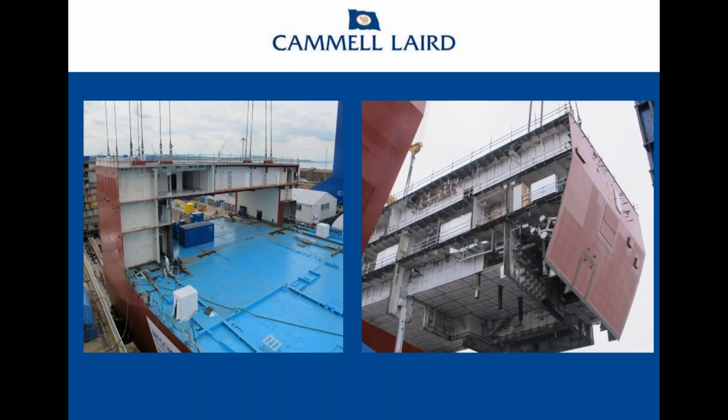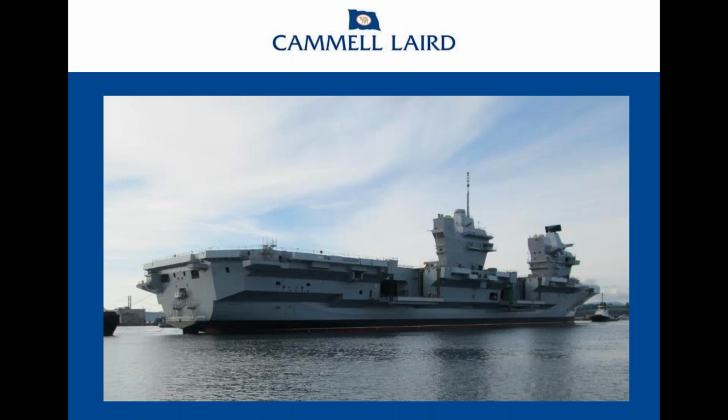And there it is on the installation. If you may remember, I talked about the tolerance of plus or minus 4 millimeters there. In fact, on the Prince of Wales, the second ship, they went out without any green, without any cutting or any additional grinding allowances on the outer edges. All the mating faces were pre-prepared and ready for welding. In other words, they landed and welded them. So the tolerance, and again the handling of these, was so important.